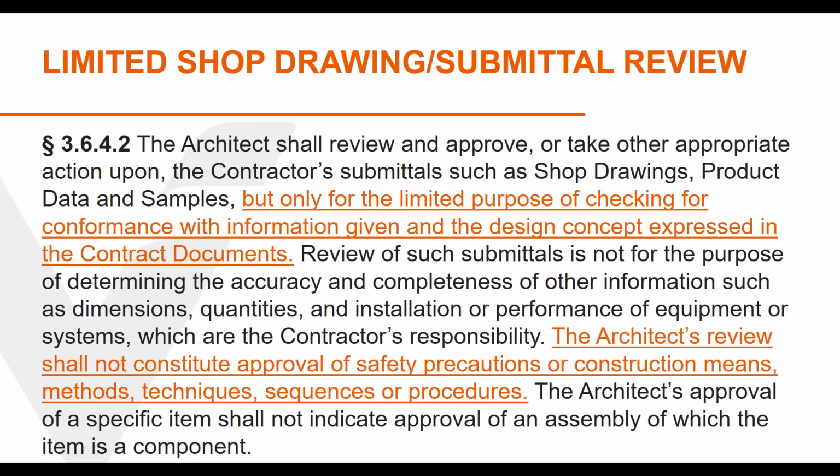The review of shop drawings can be a minefield for design professionals. Experience shows that it can lead to a number of claims, even though contractors would like shop drawings to be considered contract documents, and they are considered so in the consensus document system of agreements. Shop drawings are really meant only to be communication tools under the AIA and EJCDC contracting methods. So the highlighted provisions are valuable in limiting the liability of the reviewing design professional.